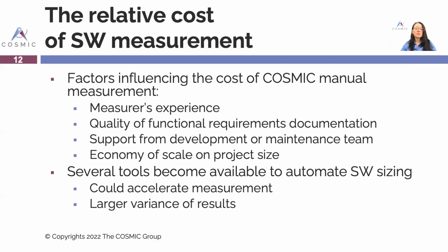Nonetheless, measuring the software size, my own data is that it varies between 1 minute per COSMIC function point to, I'd say, 2.5 minutes. That's the data I've collected while measuring in organizations where I did not even know the business domain before I started digging into the documentation they had on their software project. Well, it's 2.5 minutes per COSMIC function point.